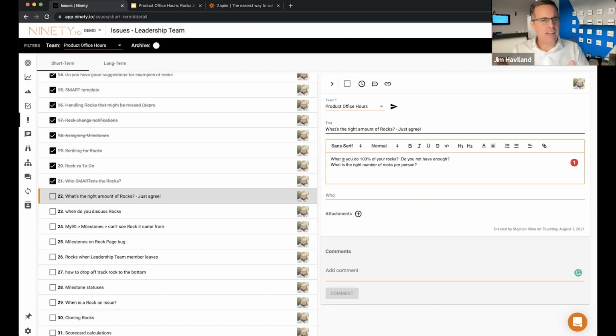So if you're getting 100% every quarter, you need some more rocks. Push yourself a little bit, beyond your limits, and just accept that, okay, that wasn't scoped better. So an 80% completion rate keeps you from taking on too many rocks and not getting enough of them done, and also from not taking enough rocks. It's not the quantity, it's the overall scope. Getting good as a team at making rocks a scope that you understand is really the key. I understand the scope of this, it should take about this long, and then just plan your time out.